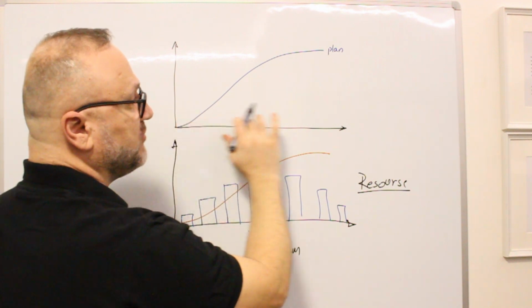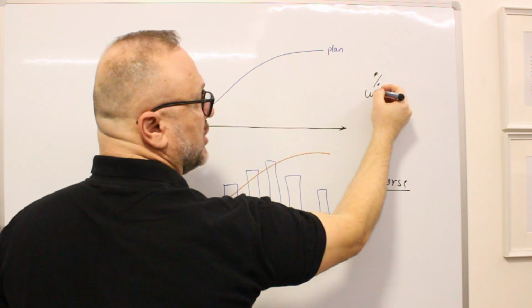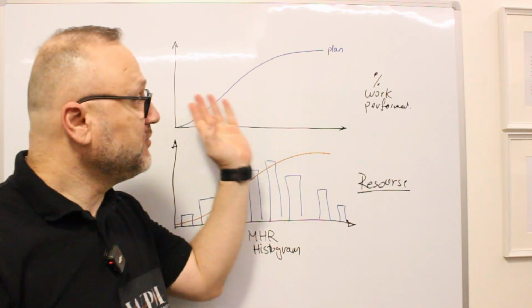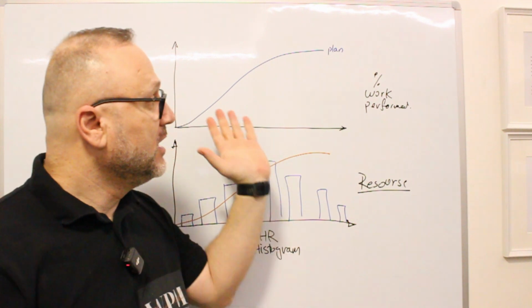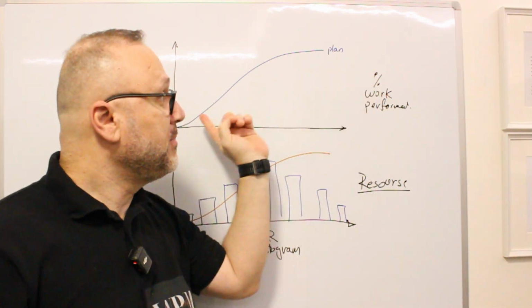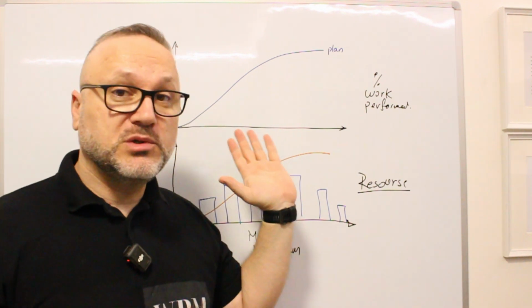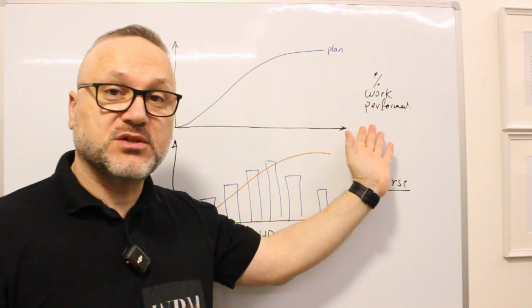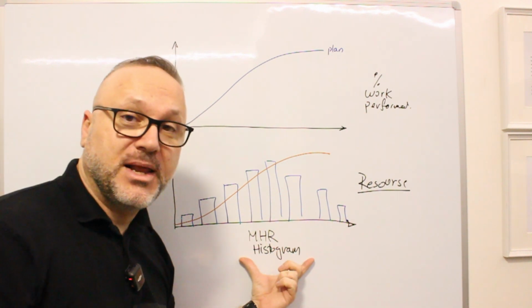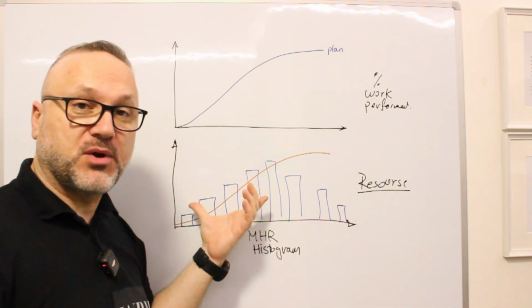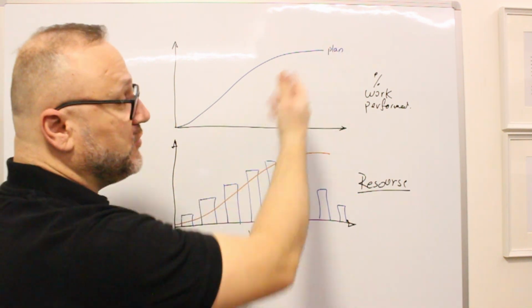And we have another S-curve for the percentage of work performed. The first graph is reflecting what you have in your schedule, meaning the progress planned in your Primavera, in your Microsoft Project or other software you are using for measuring your progress. The other one is the planned assigned resources to the project and the cost associated with that progress. Let's go first to the plan.